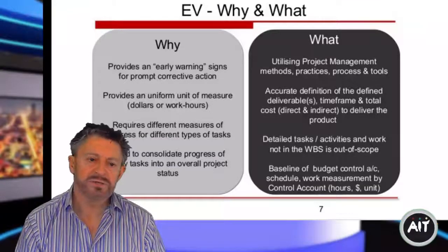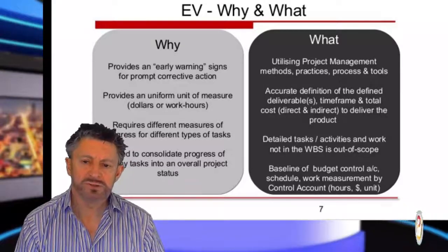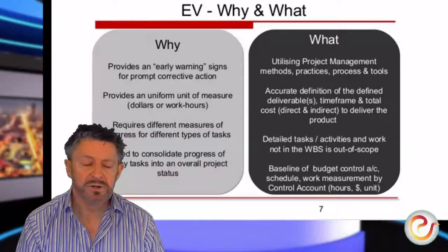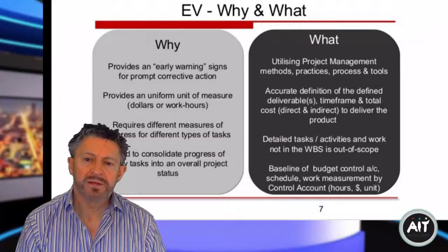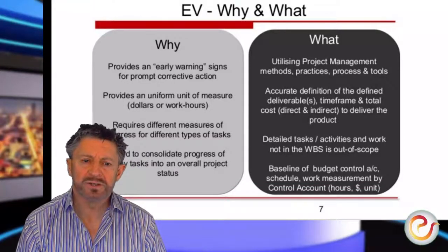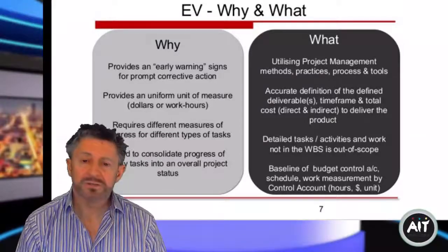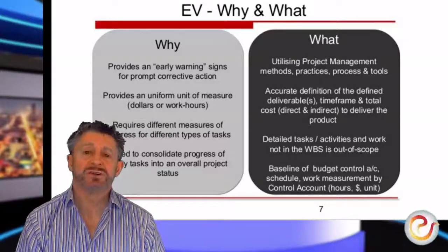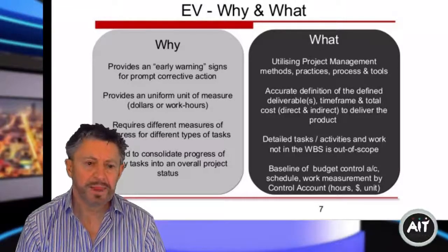That's one reason. Another reason for a work breakdown structure package deliverable being out of scope might be that it wasn't originally in the requirements, and somehow or other it got in there, bad planning, for example, or the customer has changed their minds and now they want something slightly different.